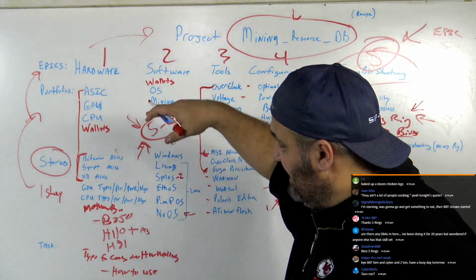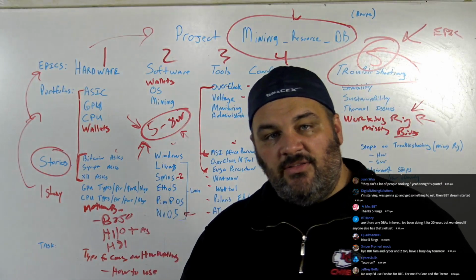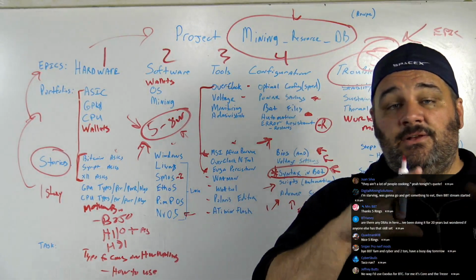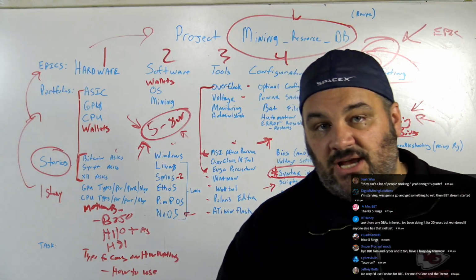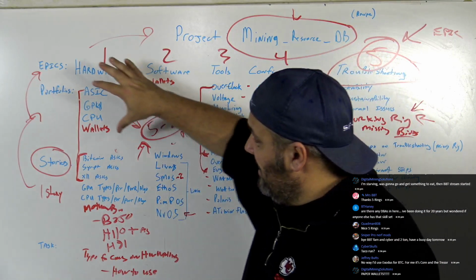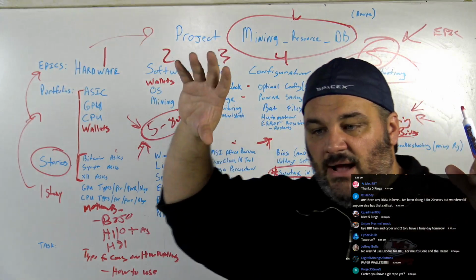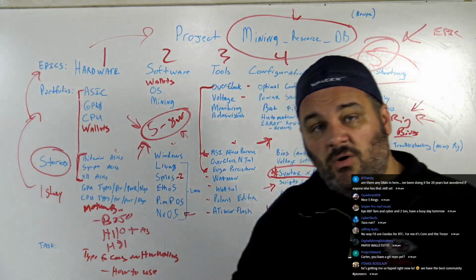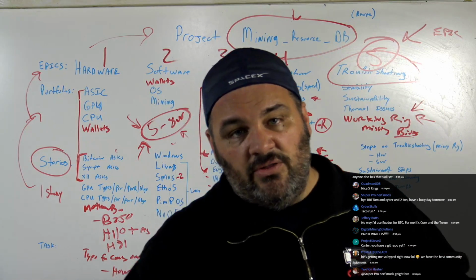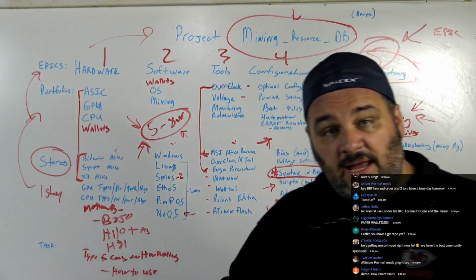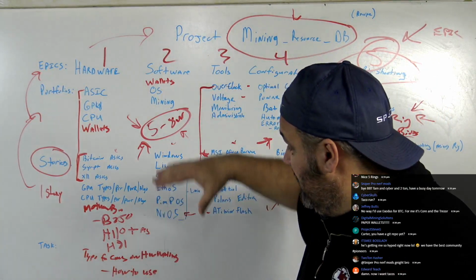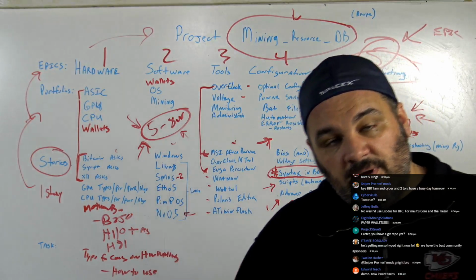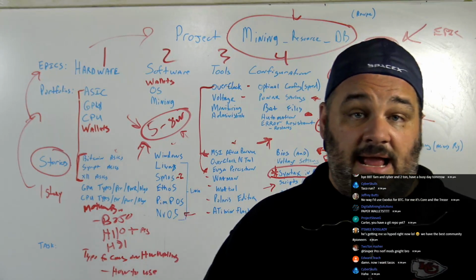The task is the stuff that you guys really want to get down to, right? Like we're saying the content, what it is, you drill down and then you get to the task. The task in the normal software world is where the magic happens. Usually you have the bigger epic. If we take it from a hardware side, I'm going to build a car. The portfolio is that car is going to be a V8, with all this stuff. The story is it's going to have a seat that's 8-way lumbar and all that. The task is going to be the mechanical engineering side of actually making that happen, right?